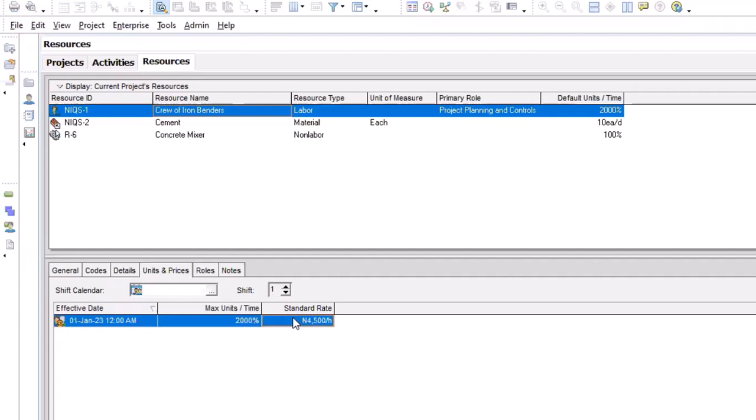Now, how do you get your unit? Remember what we did yesterday? We said we're using 5 crews, because that was what it was when we were doing the resource loading and we had over allocation. That was when we increased to 2,000. And we agreed that one team is made up of 4 persons: 2 fitters and 1 laborer, like 2 laborers.